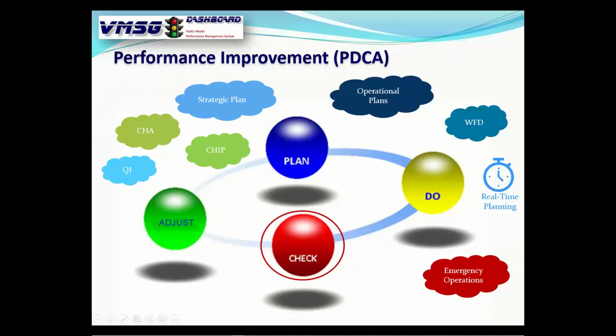That's great. Okay, so that's the check phase. You're going to go back in. You're going to look at our status, how we're doing, how we have come up over time, and that sort of thing. Then we go into the adjust phase. Now in the adjust phase, there's typically 4 scenarios. Number 1, you just saw it. That is, everything is working beautifully. We don't really have to change a thing. So in the planning phase, we're really going to go back to look at the plan. The plan stays the same. Everything is good. Continue to execute.